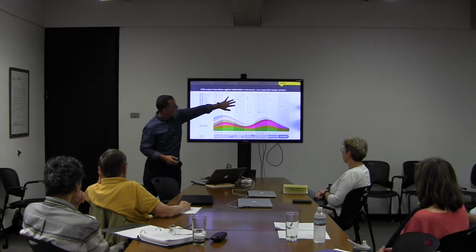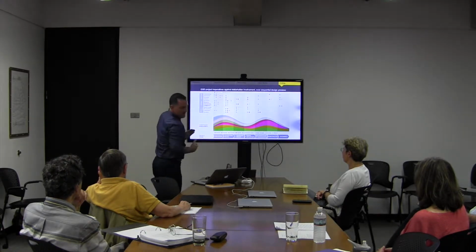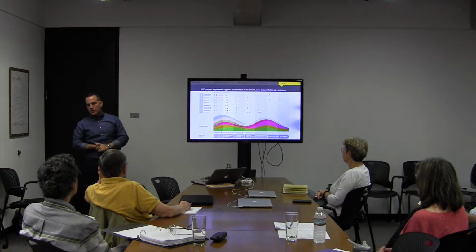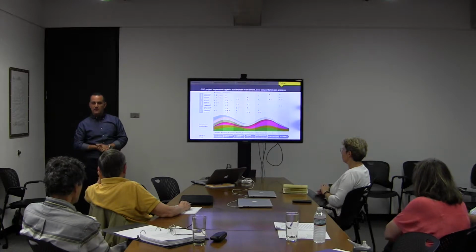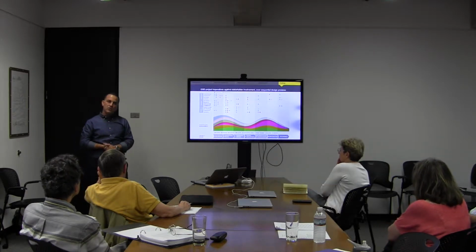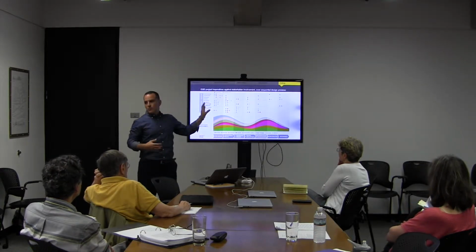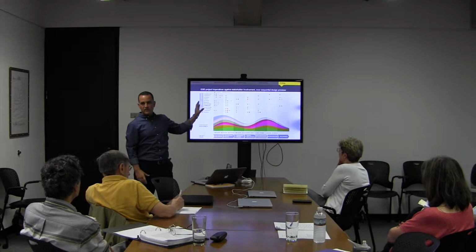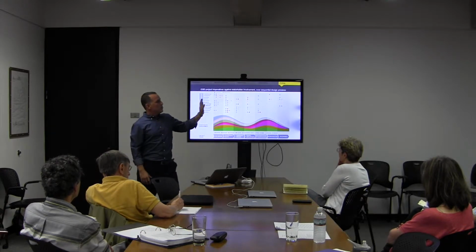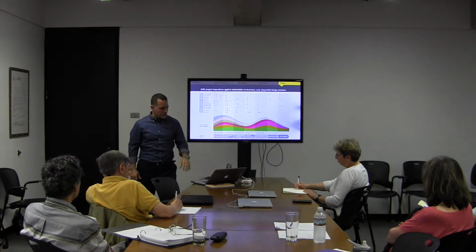You can also see in this metric that the level of involvement, or the amount of effort and involvement that you put up front by all the consultants and designers, is not just the architects, and it is not just the developer or the project manager. They all had to put in much more effort to begin with, which is not the way a conventional design process works, in order to get the rest of the process to flow more smoothly.